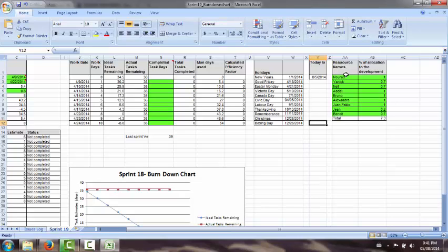We then ask people to notify us of how much time they are planning on spending in the sprint. The closer you are to 1, the better. However, be realistic. Some people work part-time, some people take vacation, and we reflect this. We want to make sure that the amount of time our team spends doing work is realistic and we don't overburden them with tasks.